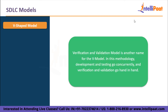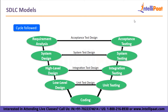Next, we'll talk about the V-shaped model, also known as the Verification and Validation model. In this methodology, development and testing go concurrently, and verification and validation go hand in hand. The key difference from the waterfall model is that in the V-model, testing and test planning begin earlier. The model has two phases: the verification phase and the validation phase. Under the verification phase, we have requirement analysis — where all necessary data is acquired and analyzed — then system design, where the product's architecture and components are made and recorded in a design document.